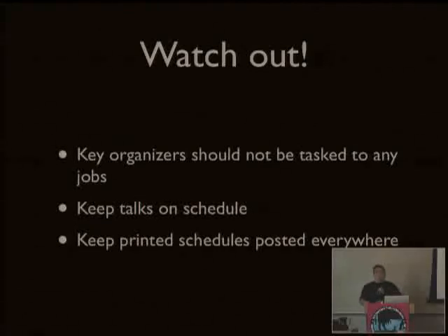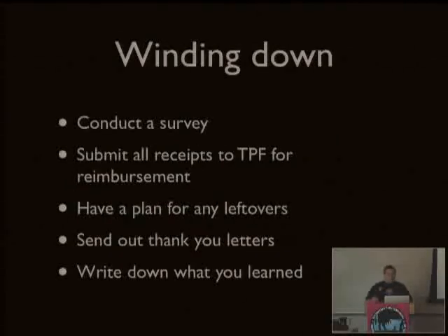Make sure you have people whose job it is to make sure that the talks stay on schedule. Speakers, such as myself, tend to go over on their time. So you need to have someone there to make sure that they don't go over too bad, that you keep things rolling. Because if somebody at the beginning of the day takes way too long, then it just cascades down for the rest of the day. Keep printed schedules posted everywhere. Okay, the interweb is a great thing, but only if the Wi-Fi works. Make sure you have printed copies available and posted everywhere so people don't have to pull up their iPad every single time to see what the schedule says.